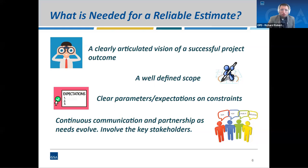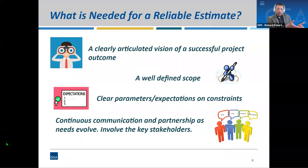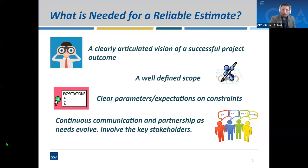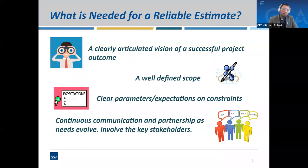A planning stage can last longer than an execution phase because of funding challenges in many federal agencies. By the time funding is issued, there could be a significant gap where the old estimate might not be updated to market conditions or might not reflect scope modifications that have happened throughout studies done year after year. We have to recalibrate the scope periodically to make sure it is aligned with the expectations of all stakeholders and partners involved in delivering the project successfully.